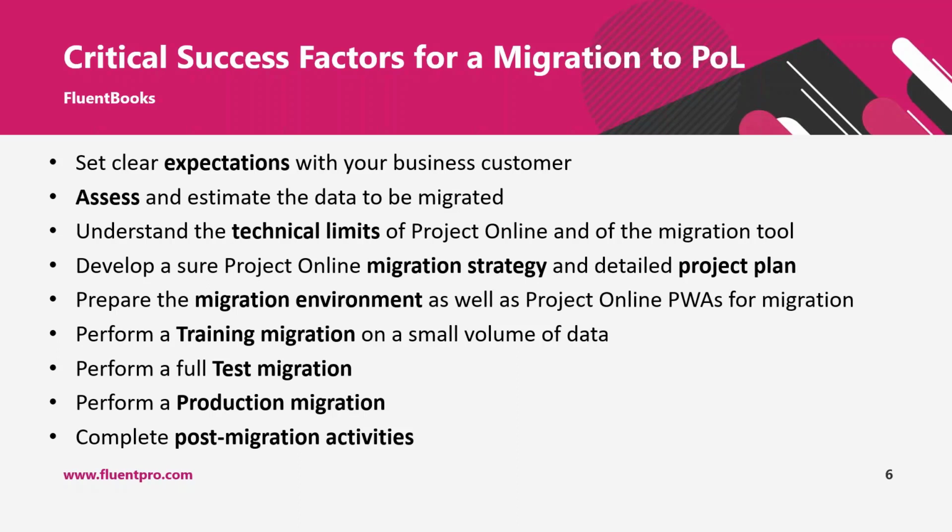The migration itself can be split in several stages, and what we advise is first to perform a training migration on a small volume of data. And during this migration, you will get familiar with the data you're going to migrate and also with the tool, because the tool itself consists of several wizards which should be used in specific sequence.